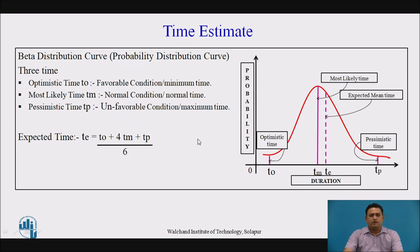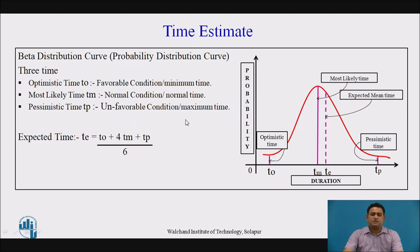The most likely time is the time when the particular condition is a normal one, and it is the normal time required for the completion of the activity. The pessimistic time is the time when the condition is unfavorable, and it is the maximum time required for the completion of the activity. With the help of all three time estimates, we define the expected time of each activity, and with the expected time, we define the project duration.